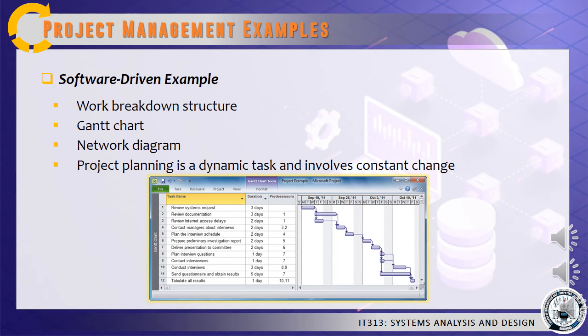Your manager would like you to create a Gantt chart and a PERT chart that show all tasks, dependencies, dates, and total project duration. Your first step is to create a Gantt chart showing the necessary information. You decide to use Microsoft Project to construct the chart. As you enter each task, you also enter the duration and the predecessor task, if any.